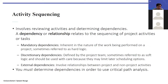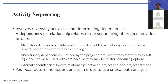What is not shown in the work breakdown structure is the sequencing of tasks, because the links between items in a WBS are non-directional — there are no arrows. The sequence — which should happen before or after — is planned in time management. There are three kinds of dependencies: mandatory dependencies (by logic or nature of the work), discretionary dependencies (a soft logic defined by the project team, not a physical law), and external dependencies (depending on non-project activities). There is also the concept of critical path analysis.